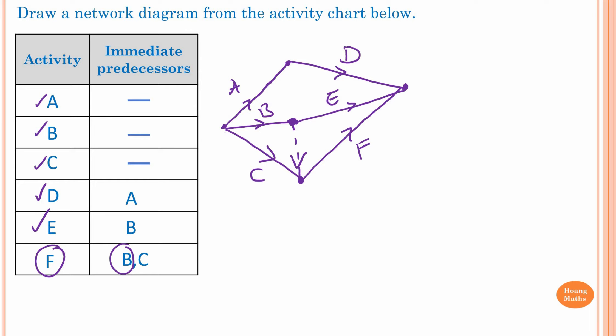You cannot draw a solid line here. If you draw a solid line, that represents an actual Activity, and there is no activity between B and F — it goes directly from B to F. That's why we have a Dummy Activity here.